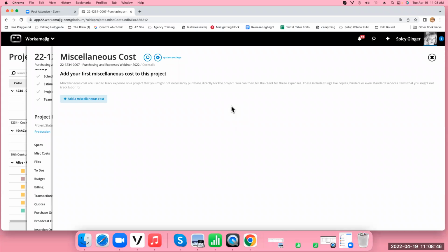That would be what you would do for that: just check the box that I want to show it on the project, account for it as an expense, but not bill my client for it. Otherwise, if I do want to bill my client, it either needs to be billable or put in as part of the estimate, which can be the new one. So on that note, Leslie, thank you very much.